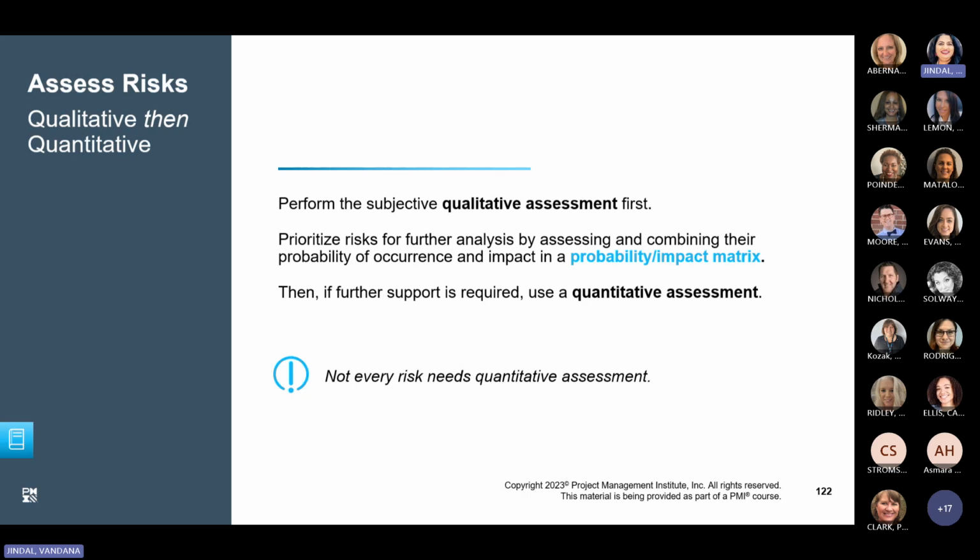in a qualitative manner. But if you want to put numbers to that, you need to do a quantitative risk assessment. For likelihood, let's say there is a 60% chance that this key team member will leave. And the impact includes $10,000, let's say, per day that the project runs over schedule. And it may take up to, let's say, 60 days to find his or her replacement. So if you do the math, 60 times 10,000 times 60% turns out to be 360,000. Now it gives the project manager an assessment of how much it will cost, putting the qualitative risk in numbers. Quantitative risk assessment helps the project manager understand the potential financial impact of the project delays in monetary terms.